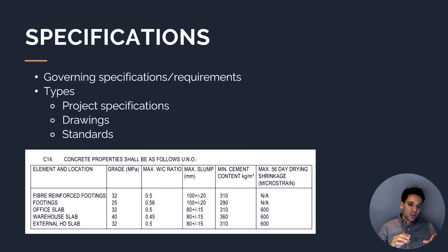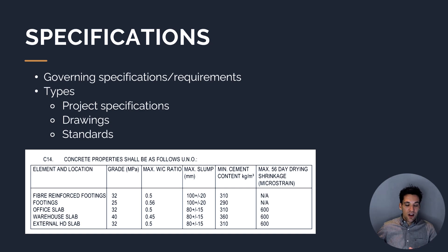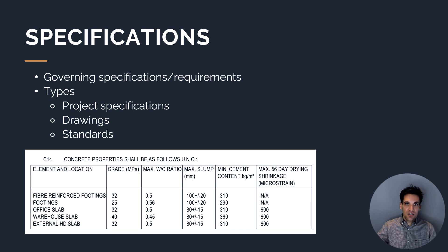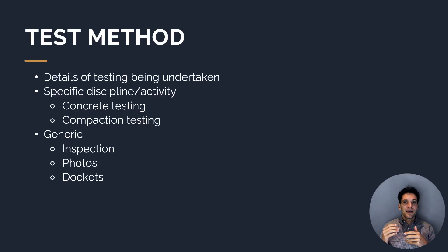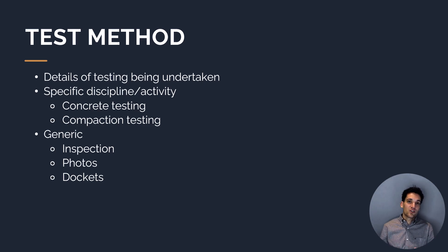Next to each step in the construction work, we document the relevant specifications — there'll be a specification that governs whether it's done correctly. These specifications might come from project specifications, notes on drawings, or relevant standards. For example, if we're installing concrete reinforcement, there'll be a specification stating the required cover on the reinforcement, and that's what we need to check. Then we document the test method — the test or check we're doing to ensure the work is done correctly — which could be concrete testing, compaction testing, visual inspections, recording photos, or collecting material dockets.